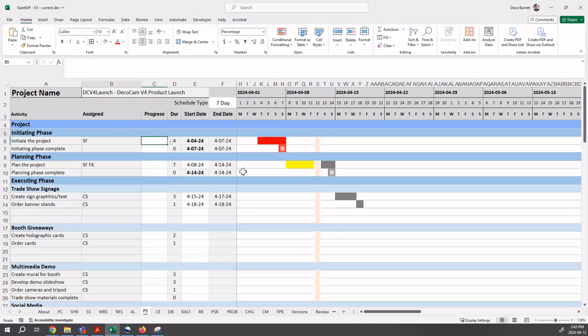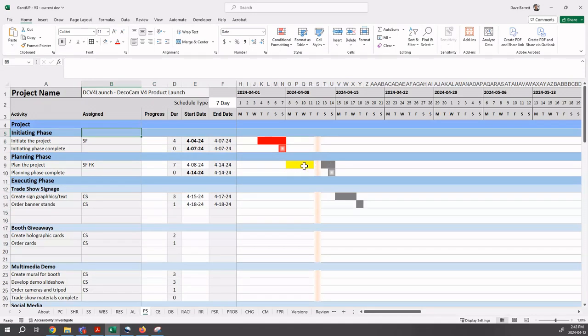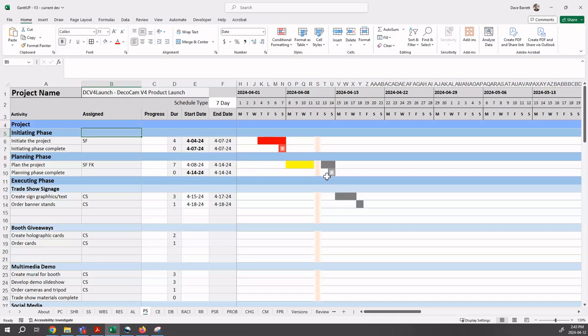This is incomplete. We haven't even started it yet, and it's late. It's five days overdue. So it's indicated to be red. Yellow on the other hand is this activity is in progress. You notice how today is in the middle of it. This task is in progress, but we have 0% done on this because it's blank. So yellow means it is becoming late. It's at a risk profile.